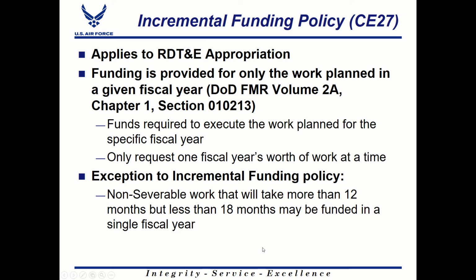Of course, there's exceptions to incremental funding as well, because incremental funding is actually designed for very much flexibility in funding availability. The exception to it is if you happen to have some non-severable work, so something that can't really be broken into monthly or yearly chunks, but that work is also not scheduled to be longer than 18 months.